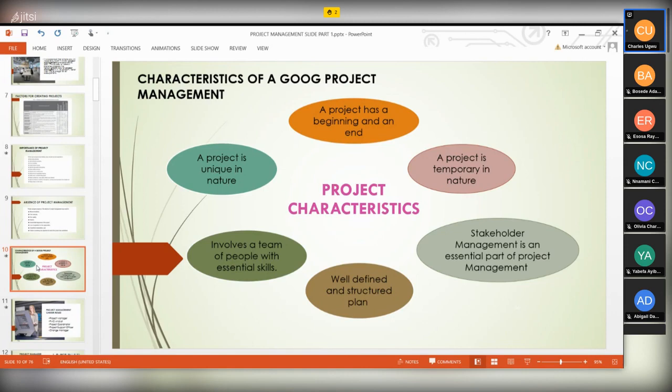It is a change. It's a scope creep, which you have to document very well before your project will overrun. You need to document it and get a relevant approval from your line manager or the relevant authority. It must be approved. If you are meant to run a project for this course, it is going to be a 4 months project.